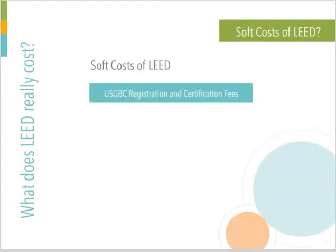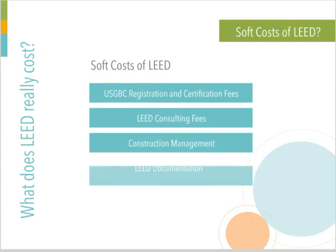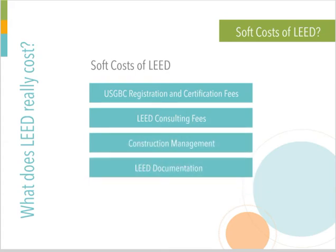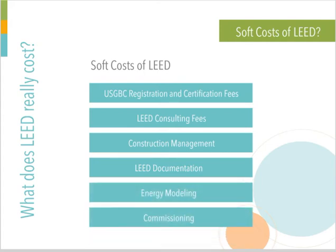As contractors, you may wonder what are some of the other costs associated with LEED. These are the cost categories that are LEED add-ons — that is, add-ons to a traditional building budget. Some items, such as commissioning, energy modeling, and construction management, could be incurred even without pursuing LEED certification.